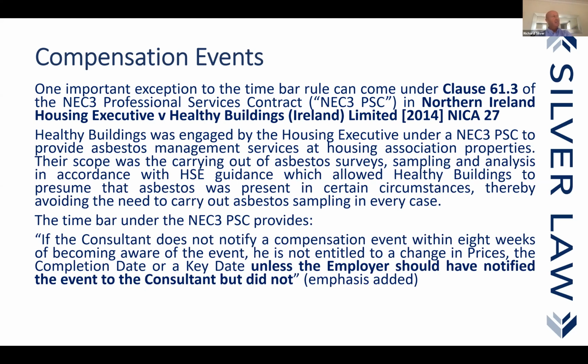What contractors all too often do is they issue a relevant event notice like this, which is inadequate. Dear sir, we hereby notify you under clause that we have been delayed by reason of one of the following relevant events. They then list every one. At the moment, we cannot assess what will be the delay to completion, but you have our assurances that we will make every effort to mitigate such delay. Whilst writing, we're also likely to be incurring loss and expense for which we will seek recovery. Lots of people are now going, how did you know that? That's in our file. That is rubbish.